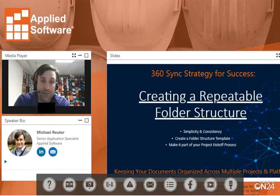I think it's always a good idea to create a folder structure template, whether that's on your server that you always save, or definitely if you're using something like BIM 360 or Procore, you create a template project that has all of your base folder structures already built into it. And then you definitely need to make that part of your project kickoff process.